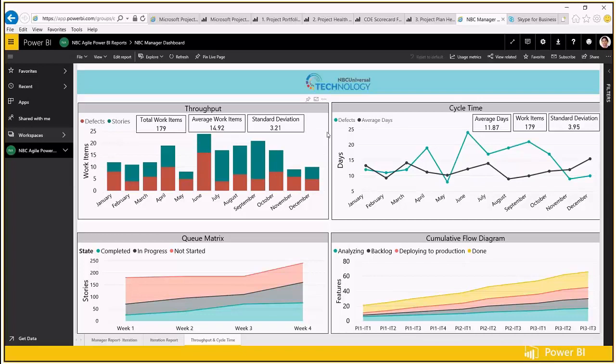So, for example, you track the number of work items completed and defects found against those over the time axis. On the other hand, an indication of how many defects were found over a period of time and the number of days taken to correct those. Such information, if tracked frequently or at least at different project stages, enables project managers and teams to make improvements, to balance these trends and lead towards good quality.